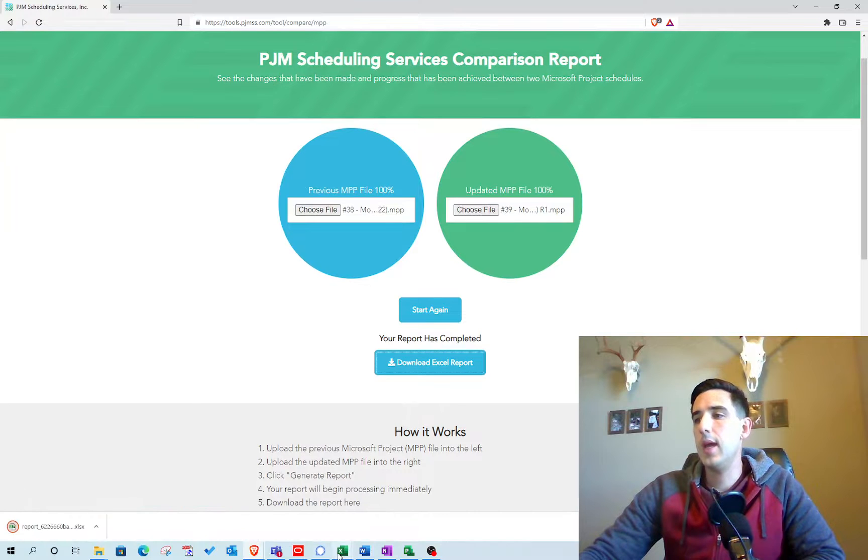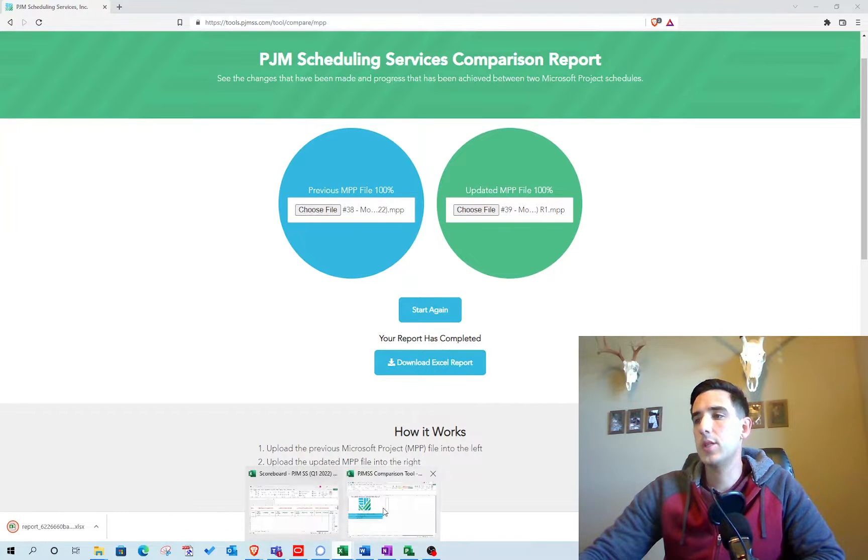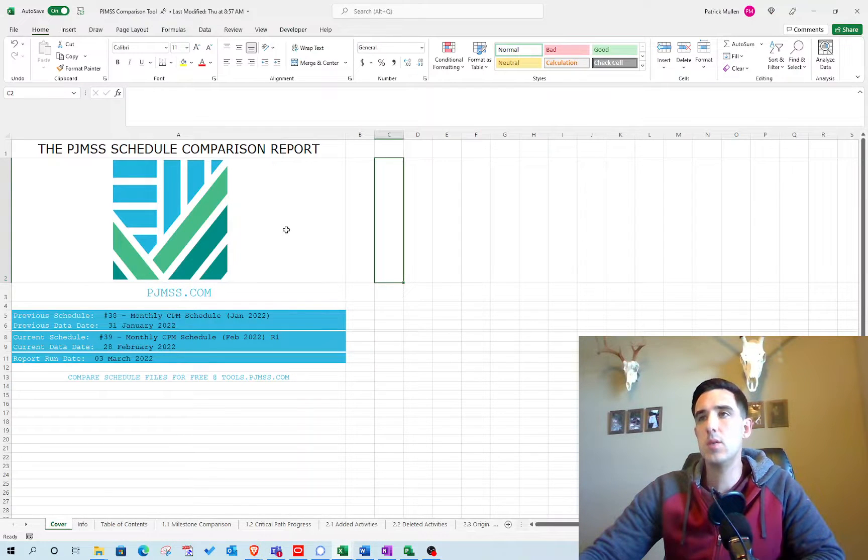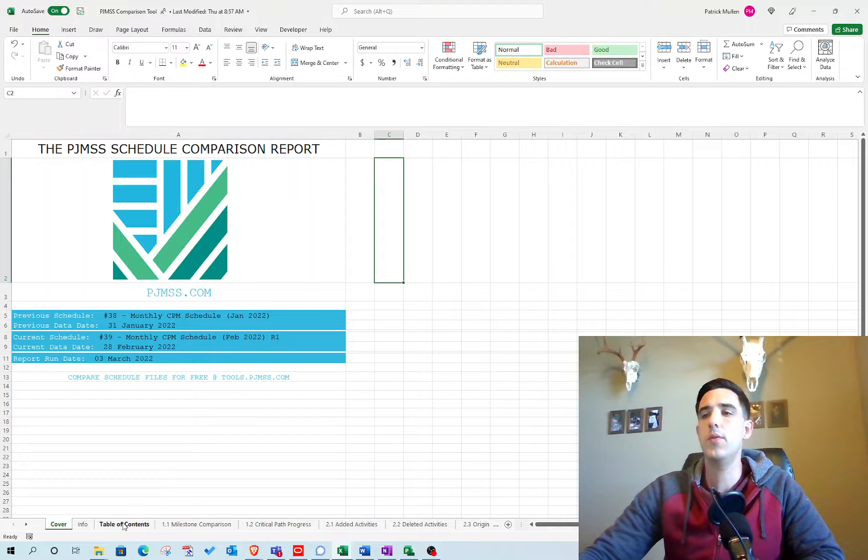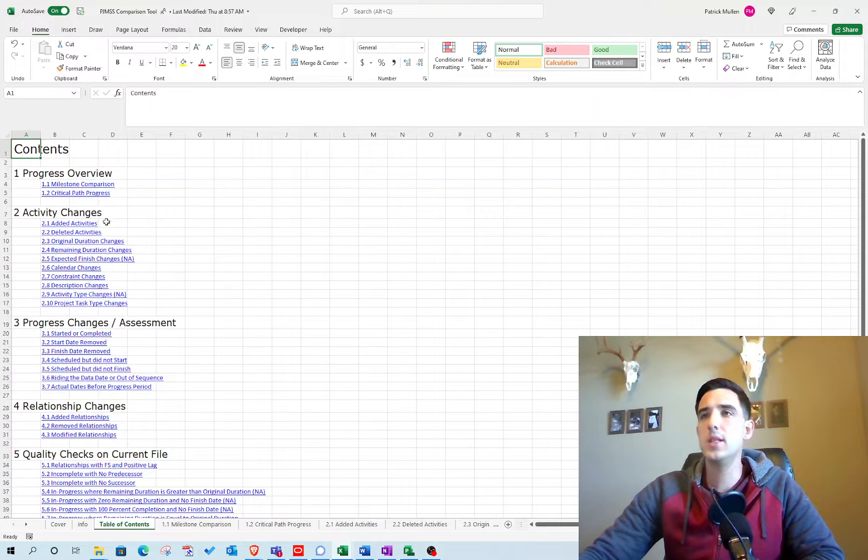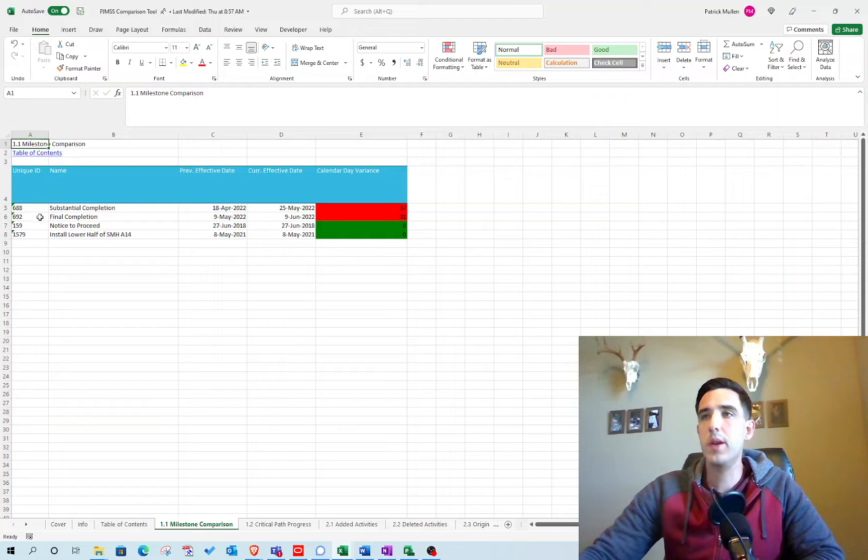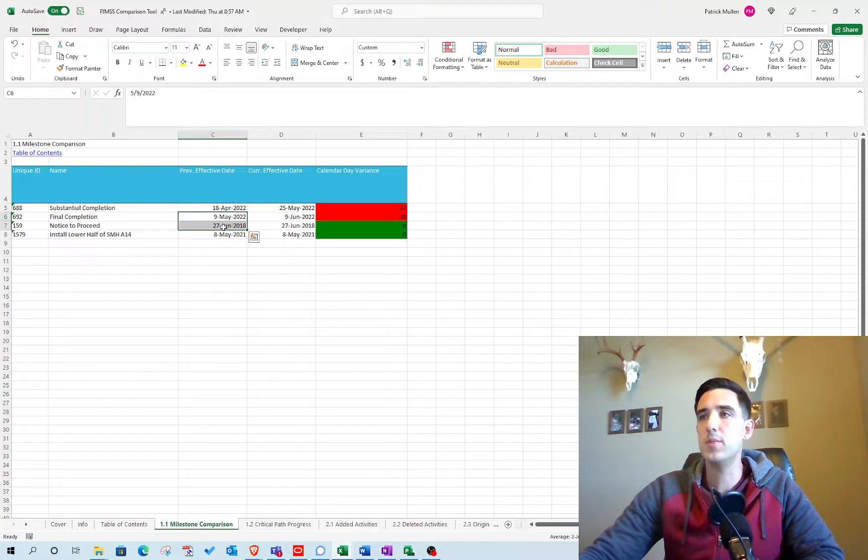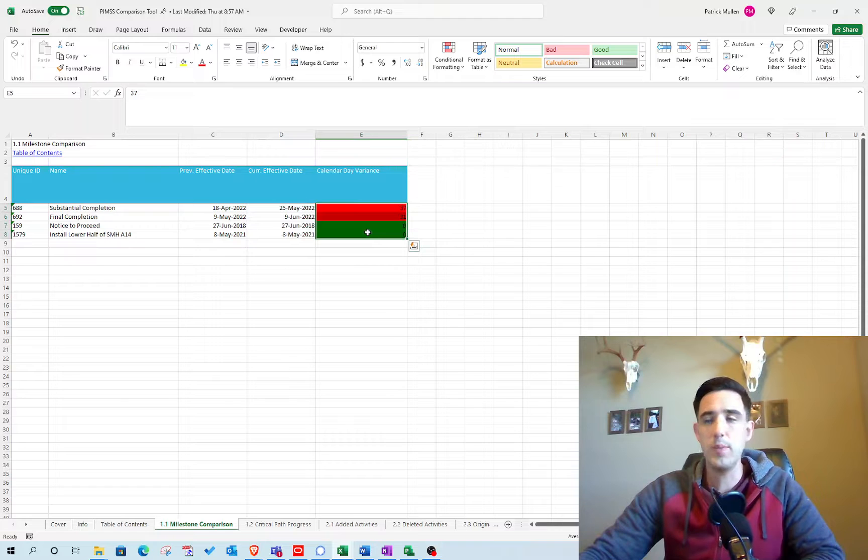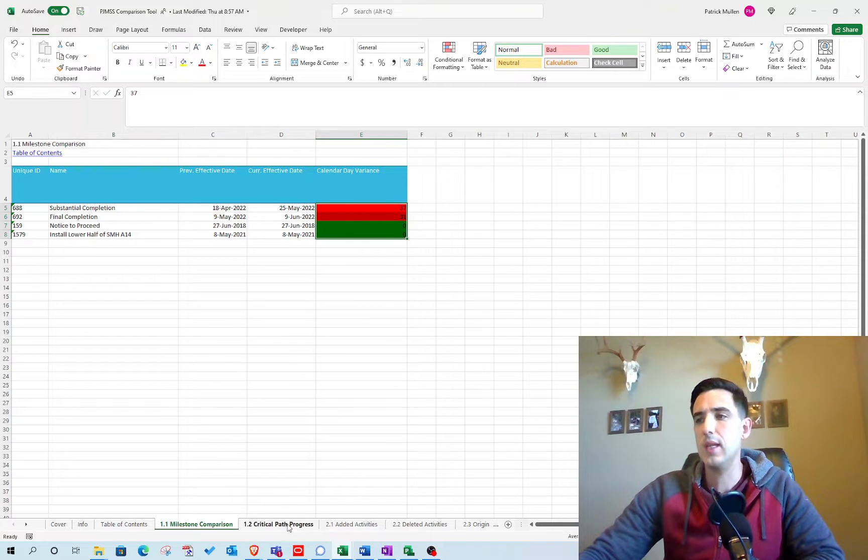Let's go ahead and open it up. This is what the report looks like. If we go to the table of contents, you can click on Milestone Comparison. That compares the previous milestone date to the current date and shows you the slippage or the progress gained.